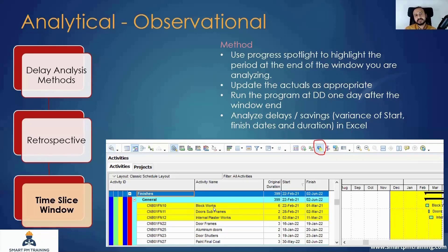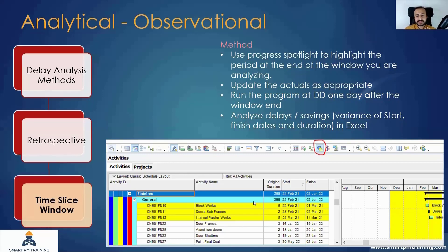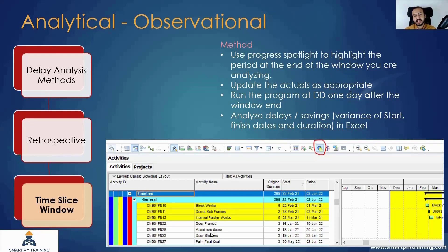For each highlighted activity, you want to extract the actual data from the monthly update and show it for the highlighted area. This exercise is different from the actual update itself, because here I want to show the actual of what should have been done during this period. For example, I am only taking from the monthly update the actual data for these highlighted activities — not for other activities like door frames or aluminium doors. I will only take the update for the highlighted activities.